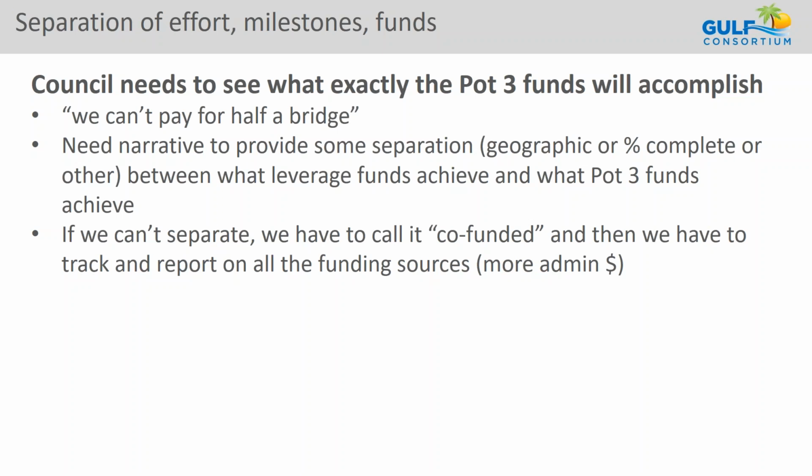So if there's a way to separate engineering and design milestones, or to separate construction into discrete finished portions, that is helpful in describing exactly what the money is paying for.